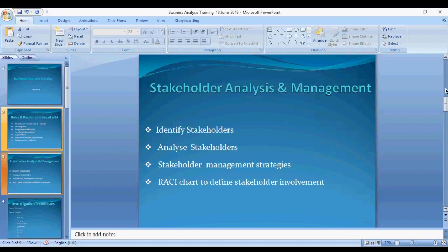Once you identify your stakeholders and have the list or the names, you need to ensure that you always revisit the stakeholder analysis during the project. A stakeholder whose interest is low when you identify them may change during the project. So as the project is progressing, you still need to revisit: do you still need this person? How do you prioritize, or what weight are you going to put on the stakeholder?